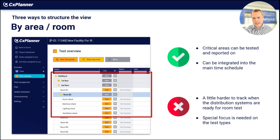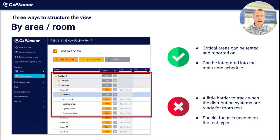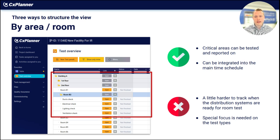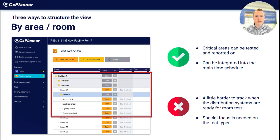The drawback of the area/room view is that it's a little harder to track when distribution systems are ready for test. For example, room B2 includes a ventilation check, but before performing that check you need to ensure the ventilation distribution system is ready — and that full overview can be harder to obtain. Special focus is also needed on test types: is this a mechanical check, pre-functional check, or system check? That needs to stay in focus when using this structure.